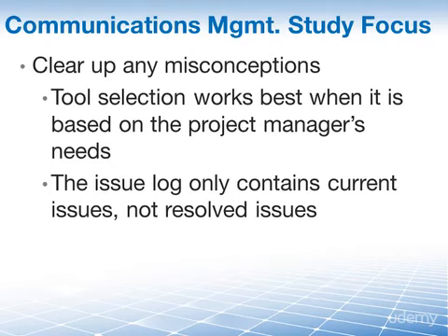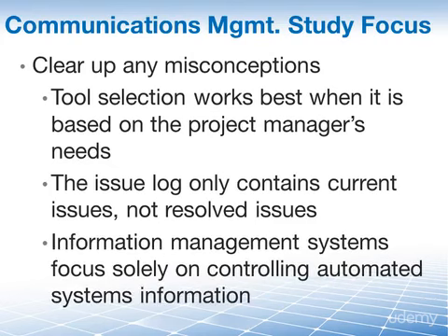Also incorrect. Resolved issues remain in the log for reference. And information management systems focus solely on controlling automated systems information. Incorrect again. Information management systems include hard copy document management, electronic communications management, and electronic project management tools. It is a very broad type of system.